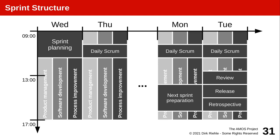The sprint is shown starting on a Wednesday on the x-axis. Rather than starting Monday and closing Friday, the general recommendation is not to have a big break over the weekend mid-sprint, but rather to have the break between sprints fall on the weekend. This means the sprint runs Wednesday to Wednesday, or in the AMOS case during the team meeting mid-Wednesday or Thursday, so that learnings from the review and retrospective feed directly into the next sprint planning without a long interruption.